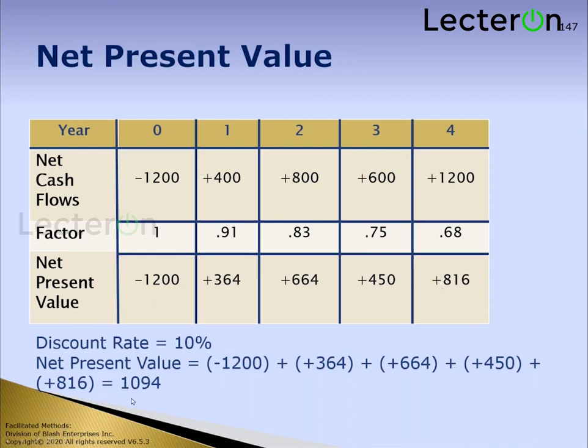Once again, it doesn't matter how you came up with that number. The fact is, if you're presented it, bigger is better. Whichever net present value is the largest is the project that you would select. It's on every exam, but that's all you have to know. Payback period is the shortest time. Net present value is the biggest one.